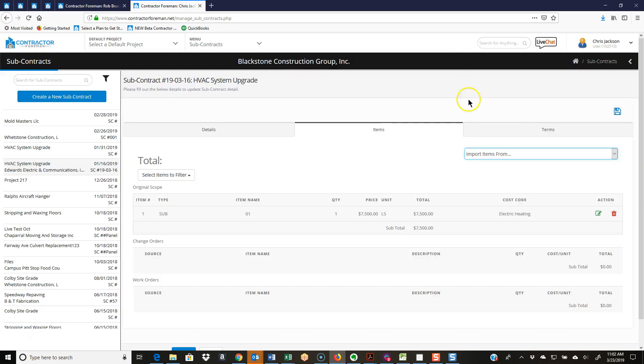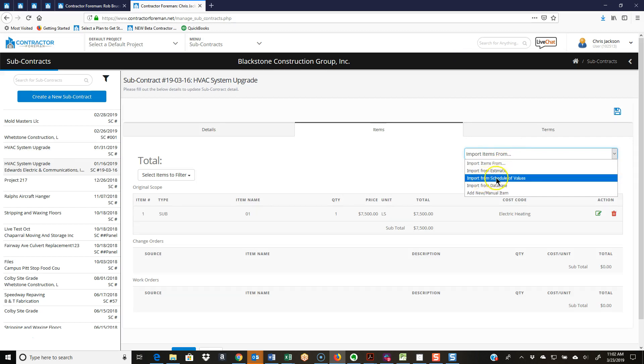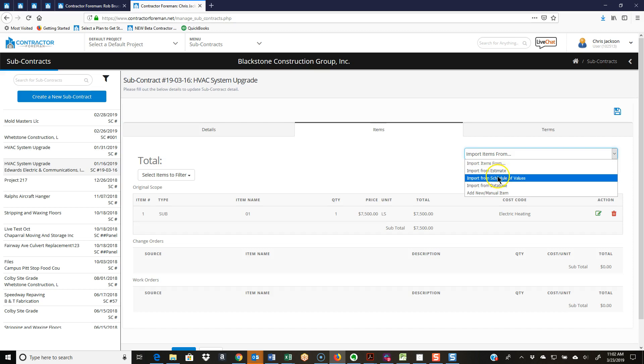I can also import from schedule of values because you don't always have to use the estimate and some people start with a schedule of values. So that's just the same process. It'll bring me up a list, I select a line or line items that I want to bring in, and it will put them down here.